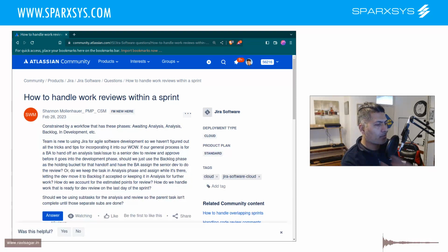Now, there are two more questions. Let us first talk about subtasks. A subtask is just a way to break down your stories into smaller deliverables. But when you're using subtasks on a Scrum board, your reports will only pick up the estimates at the story level. So if you're using subtasks for estimation, do that, but also make sure that your story is updated with the summation. You can also automate this, but it is something you need to be aware of.